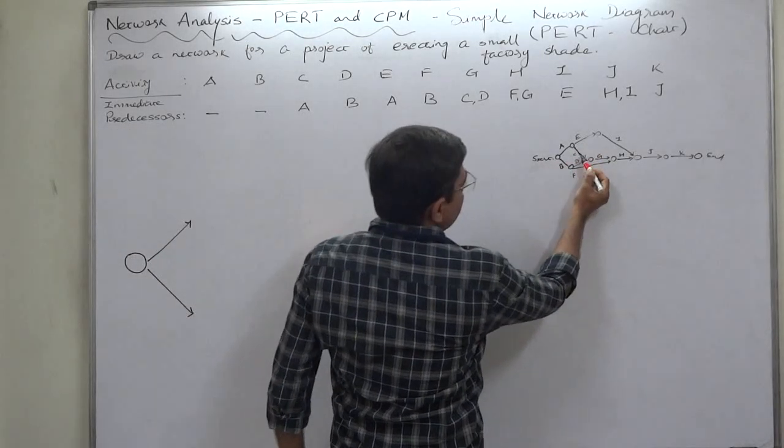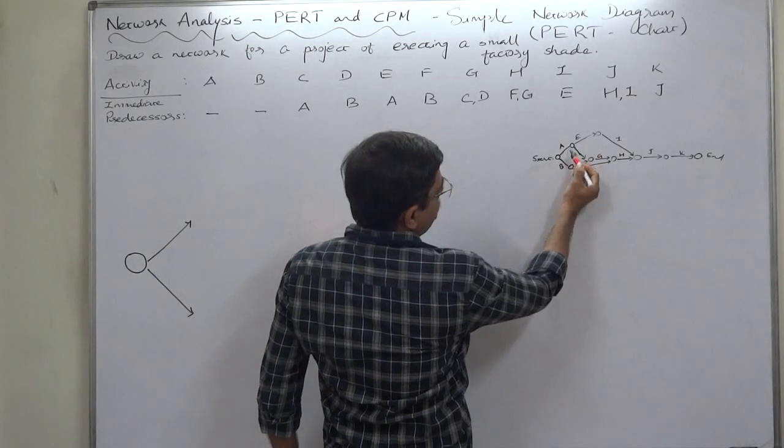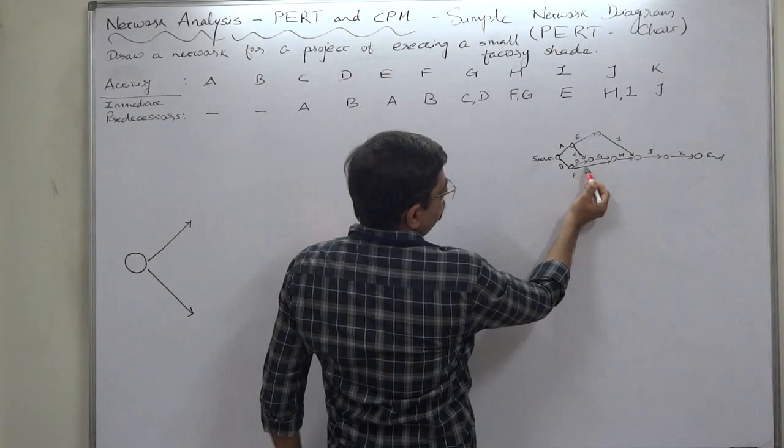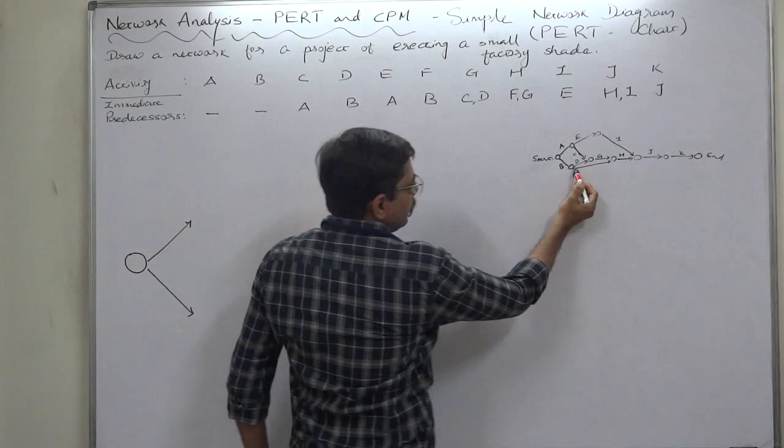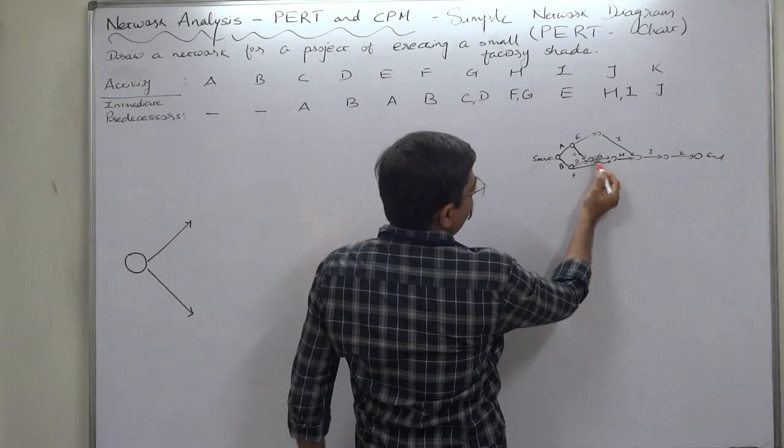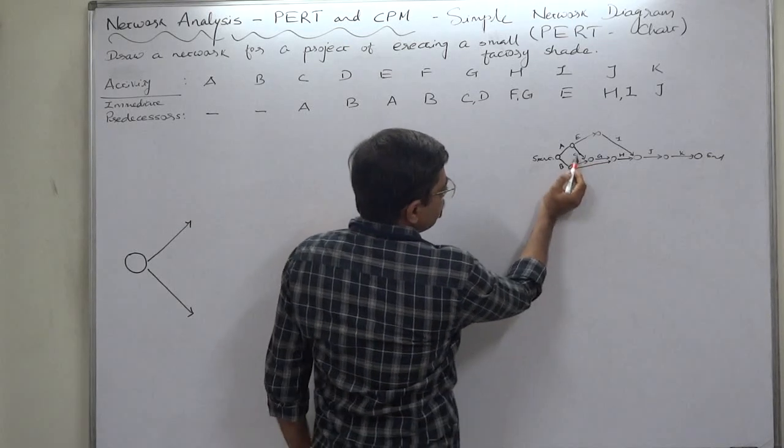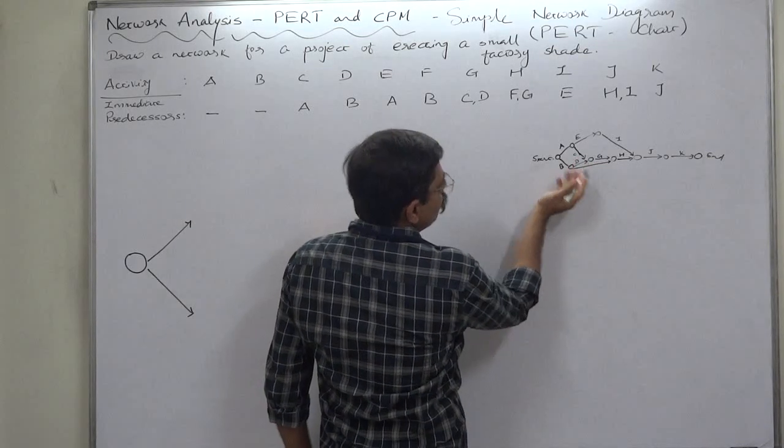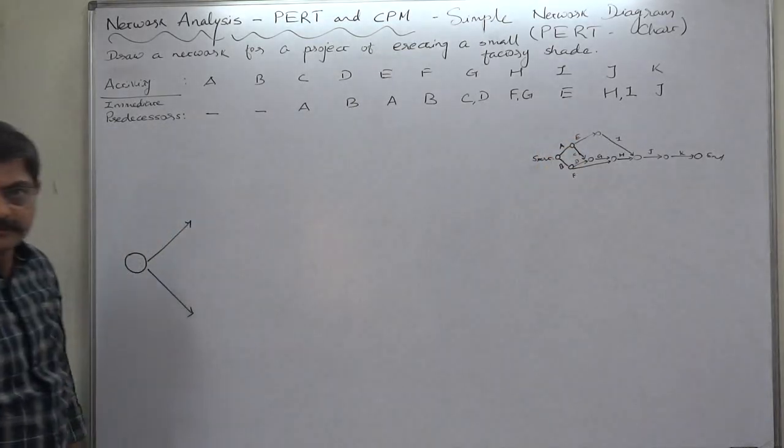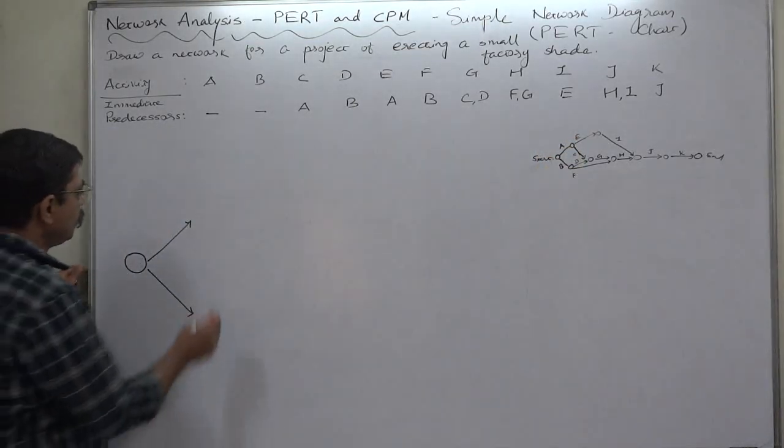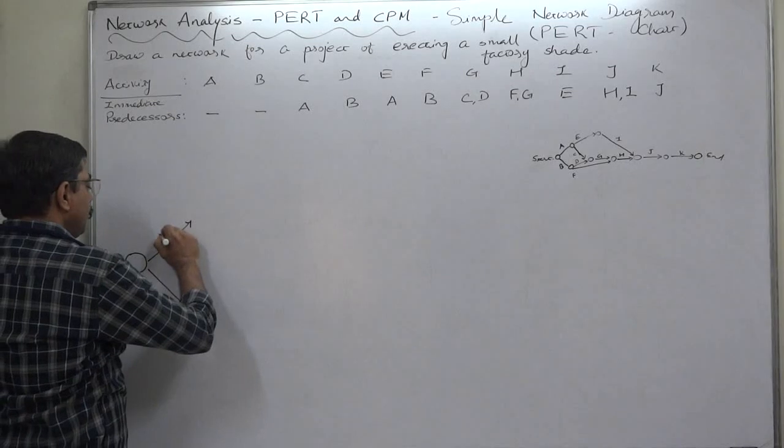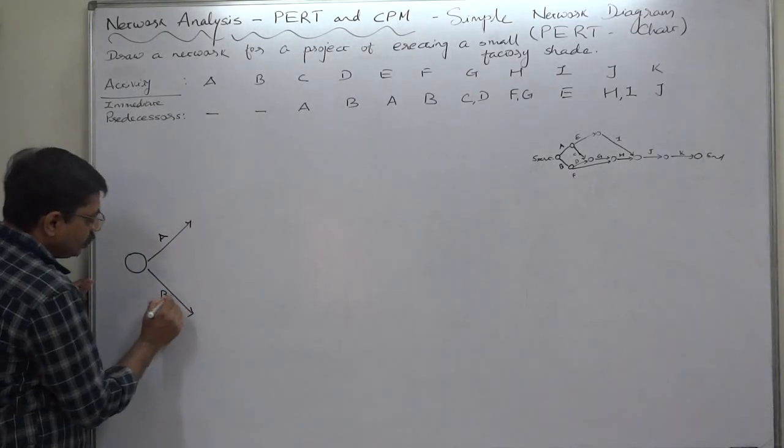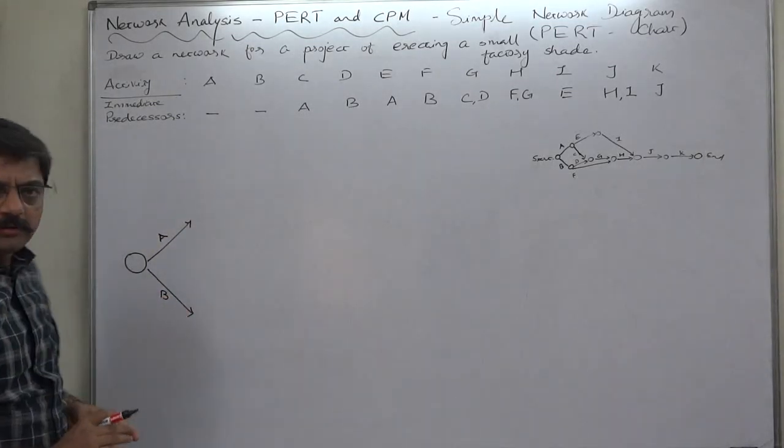Just think about the successor activities and draw a suitable chart. E starts after ending A. D and F start after ending B. C and D both are common predecessors of G, so it is advisable to take these two inside. We are going to name A to the upper arrow and B to the lower arrow.